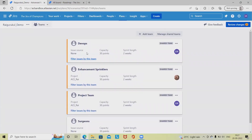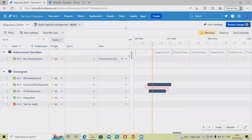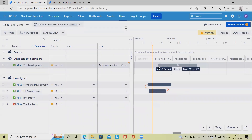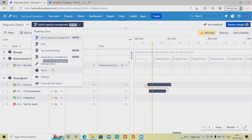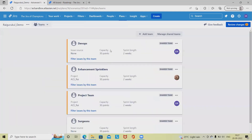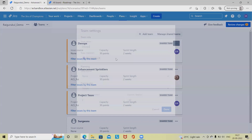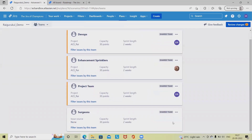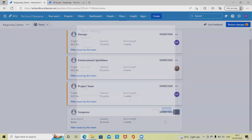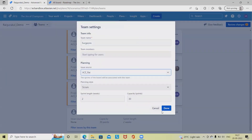Let me add another team — we have created the DevOps team, so I'm adding it here as the fourth team. If I navigate into the sprint, we can see the fourth team is showing. However, at the time of adding the fourth team, we don't have any options because issue sources are not defined. So we go to Teams and define the issue sources so they will be visible inside our capacity planning.